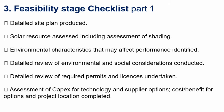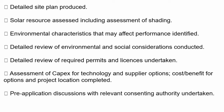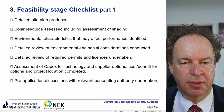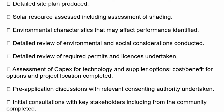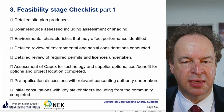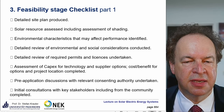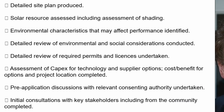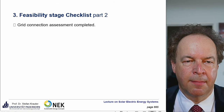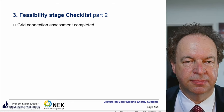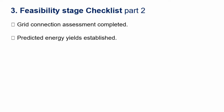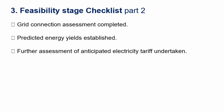That cost-benefit analysis is the most important part for the bank — they want to see the return. Pre-application discussions with relevant consenting authority undertaken — for example a local authority like a mayor or someone responsible for the land. Initial consultations with key stakeholders including the community are completed. Sometimes the community is nervous because they think photovoltaic is ugly, so you have to present detailed plans to show that's not the case, and sometimes the community wants some compensation for changes to the landscape. Grid connection assessment is very important — if you cannot put your electricity on the grid, the whole project is in question. The predicted energy yields are established and a further assessment of the anticipated electricity tariff is undertaken.